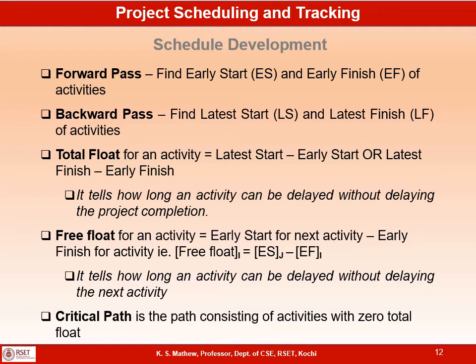But if an activity has a total float of 0, if that activity gets slipped even by 1 day, the project end date will also slip by 1 day.